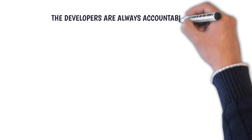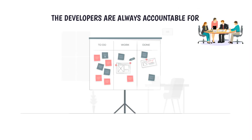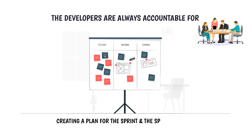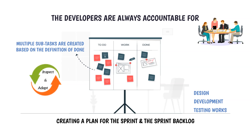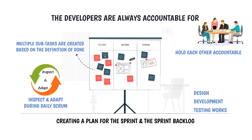Developers are always accountable for creating a plan for the sprint — the sprint backlog — and the plan may include design, development, and testing works. Typically, developers create multiple subtasks for backlog items based on the definition of done. They adapt their plan each day toward the sprint goal during daily Scrum by inspecting work done and work remaining. They hold each other accountable as professionals and continuously improve their relationship and collaboration while adopting Scrum values.